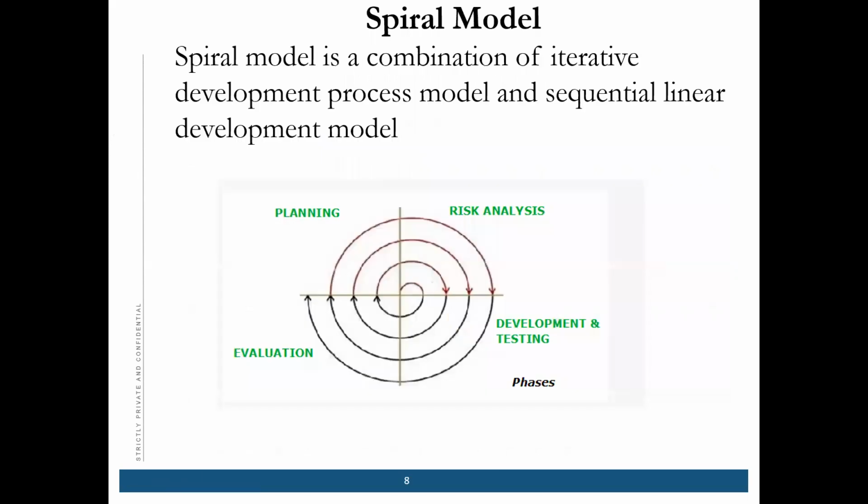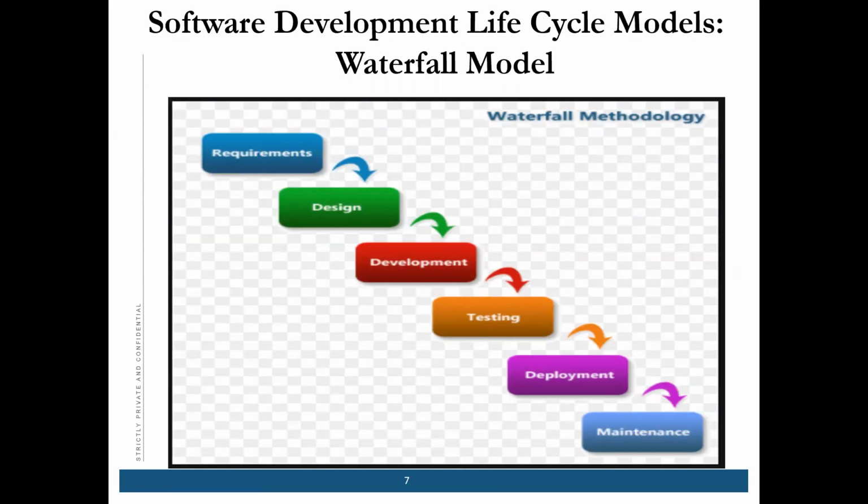And yes, that is also the drawback of this particular waterfall model, that testers are hired at a very later stage, and that's why defects also come at a later point of time. You're right. The reason is we cannot go back, unlike in the agile method, where testers can still work on the application which is being developed.